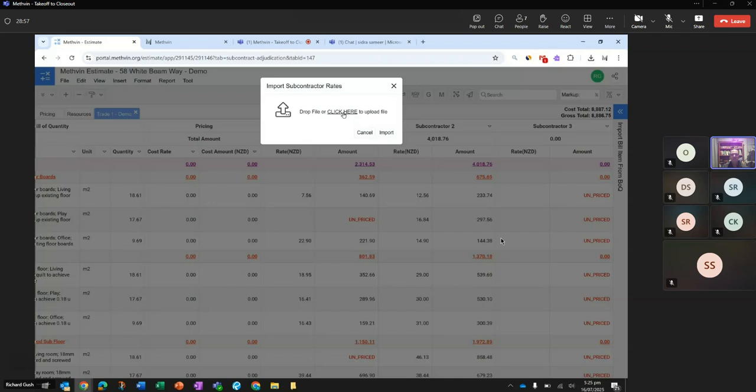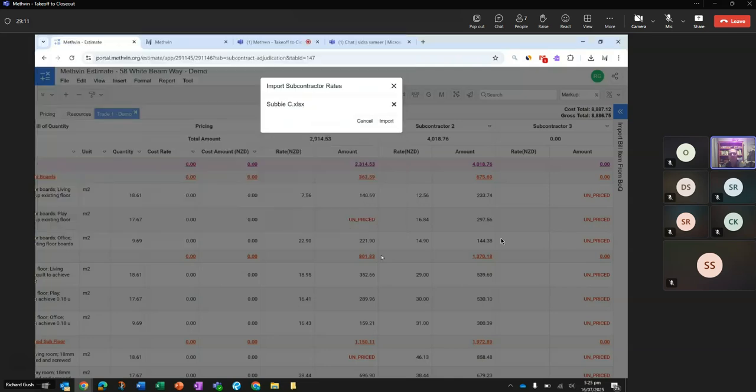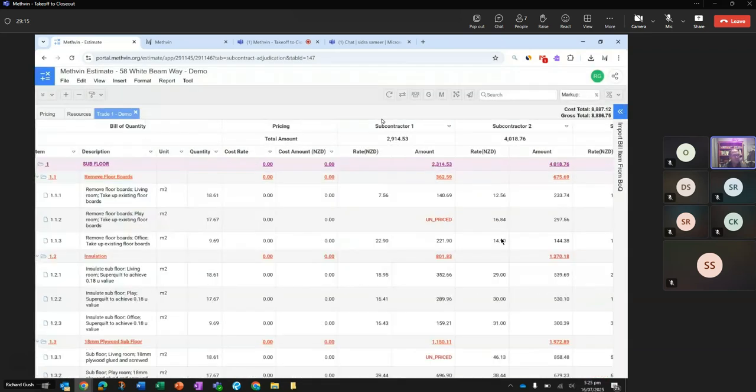So once you've got all your subcontractors in, we've got an incredibly powerful tool for evaluating the tenders when people don't complete the full schedule. Often you'll send out your schedule and hope that the subcontractors will price everything, but more often than not, they'll just price the portions that they believe they'll be competitive in, or leave out some items that they aren't interested in.